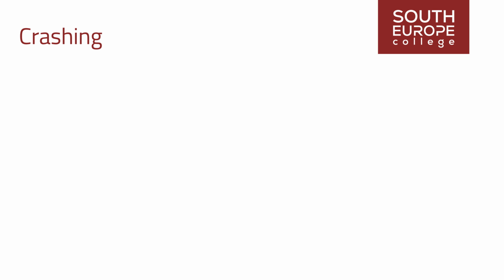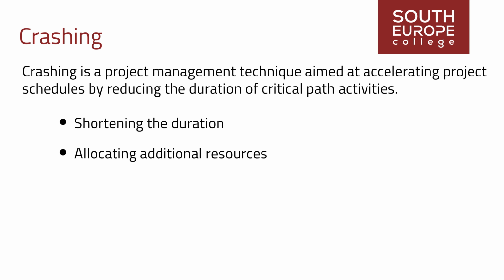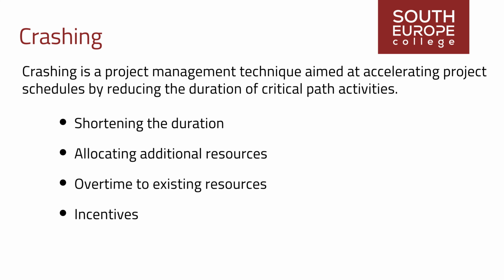Crashing is another valuable technique in project management aimed at accelerating project schedules by reducing the duration of critical path activities. Unlike fast tracking, which involves overlapping tasks, crashing focuses on shortening the duration of individual activities to meet project deadlines. This technique often consists of allocating additional resources, such as workforce or equipment, to critical path activities to expedite their completion, paying overtime to existing resources, or offering incentives to vendors to finish earlier.